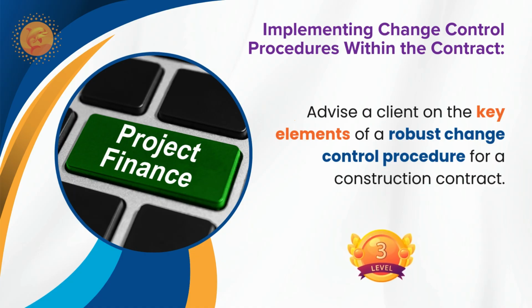They cannot keep on issuing, although the contract allows you until the taking over certificate. Anytime prior to the taking over certificate, the contract usually allows you to issue. Even though it will be very difficult for you if they issue the change order after the respective work has been completed at site.